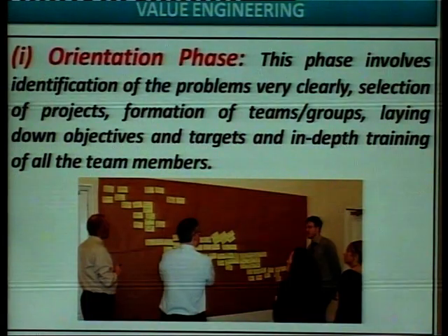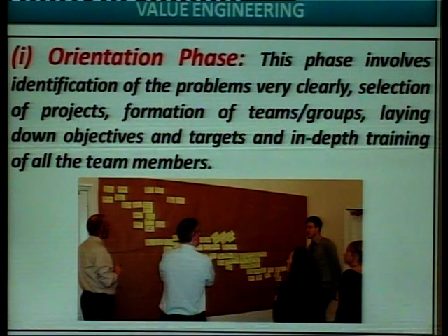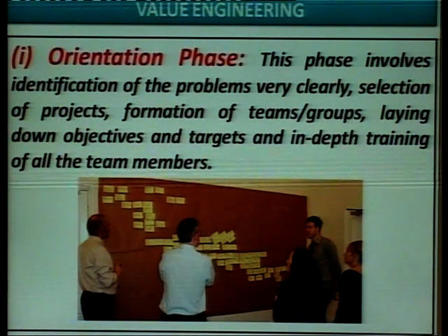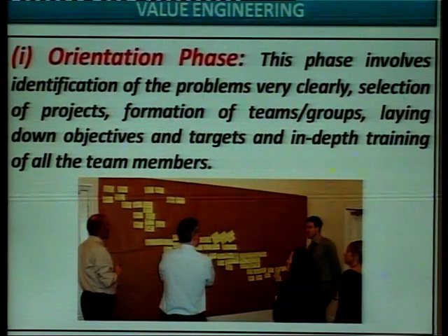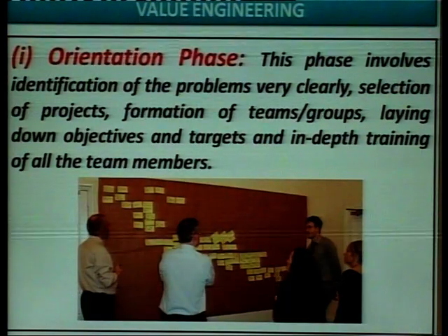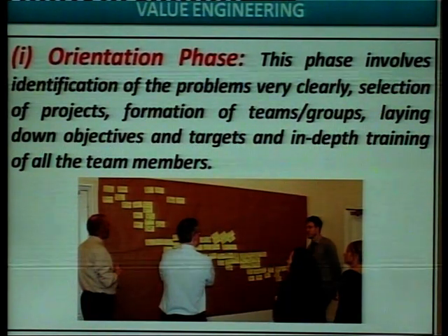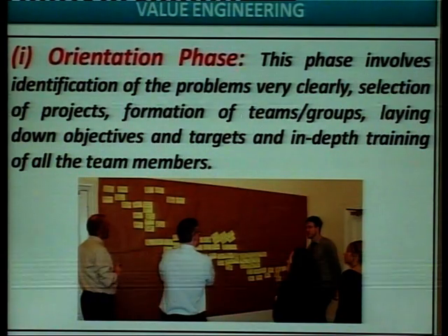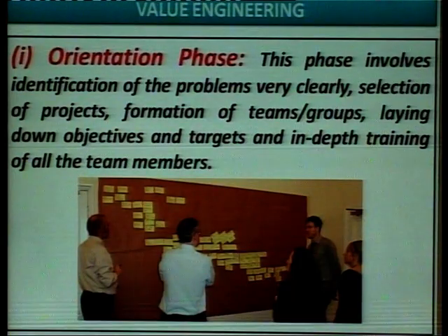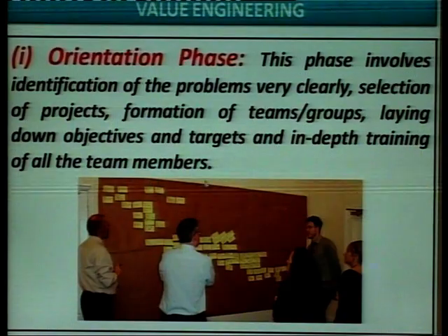Let us start with orientation phase. This phase involves identification of the problems very clearly, selection of projects, formation of teams, or you can say formation of groups, laying down objectives and targets, and in-depth training for all the team members.